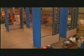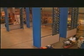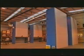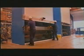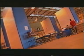Portsmouth will have 4 carousels, each capable of holding 216 boxes. The end frames are delivered and erected within the same day. The drive shafts are fitted, panelling up completed, the shelves are put in place, and the individual boxes go in. Within 5 days, all 4 carousels are fully built, and configuration starts.